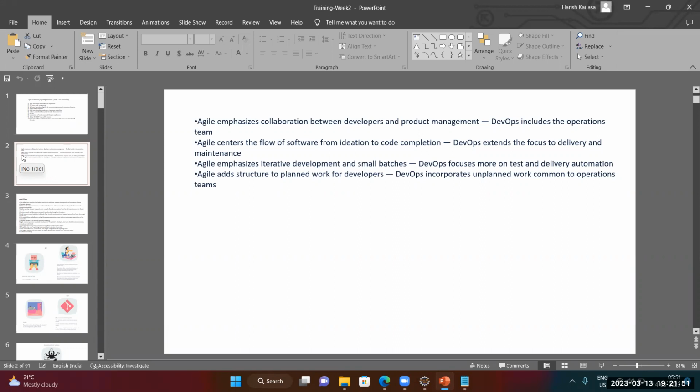He is also responsible for conducting the daily status update calls. There are a few things that we follow in Scrum. Whenever you update the daily status, you have to charge your hours. We usually charge 6 hours per day, and 2 hours we will not charge, because those 2 hours go to meeting related things and the general activity we do regularly, like checking emails.